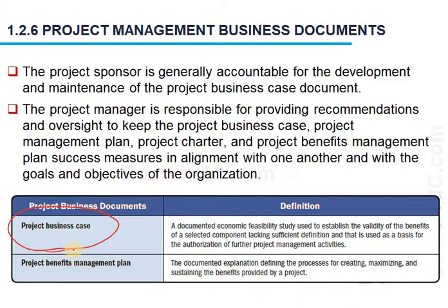So a company wants to build a 20-story building and lease it out as office buildings, someone would have done the business case to calculate all the costs that this will have upfront and then on an ongoing basis, as well as the returns or benefits that you're going to get. That's called a business case, and that's usually done before a project starts.